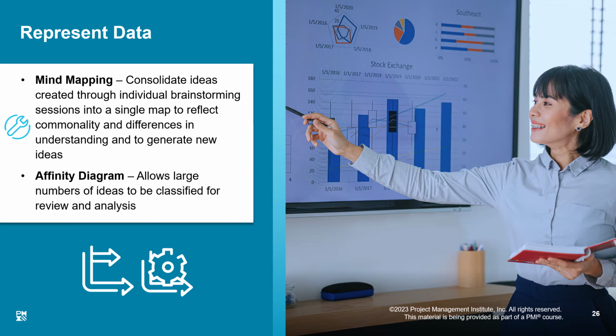Now we have got mind mapping, which we discussed already, in which we put the main idea in the center and we expand outward. It is usually done on a large piece of paper in which you write the main idea you are trying to explore in the center of the page, make a box around it, and then you divide that idea into topics of discussion, the expansion of that. Say it is subdivided into 5 categories. So 5 boxes will be created around it and they will be linked to the main idea. And then you keep expanding it out, and this is called mind mapping.